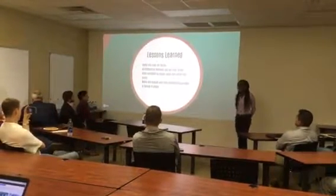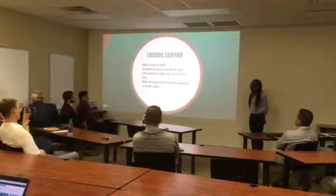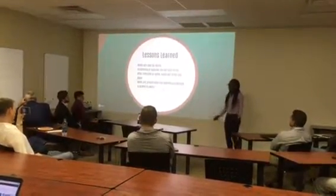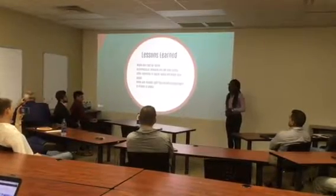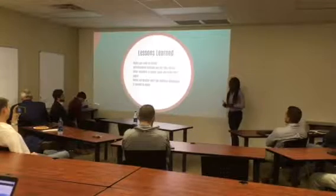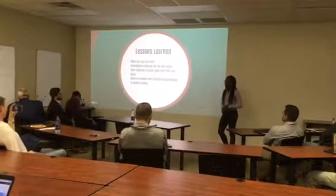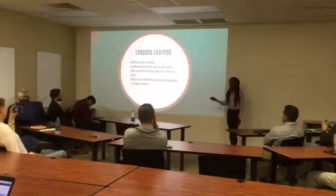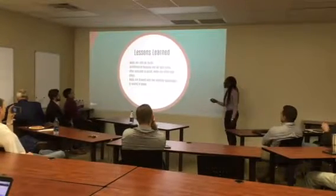Very first thing, documentation. We did a couple of submittals and RFIs, and you need to turn those in to the right people, turn them in on time, track them, and make sure it's all done before you can move on. Your RFIs need to be sent in on time, and you can't pretty much proceed until your RFIs have been answered and you've gotten them back.